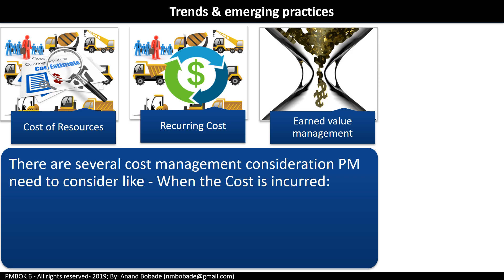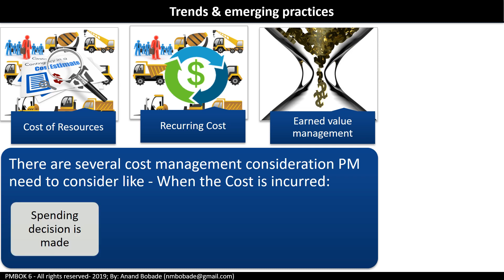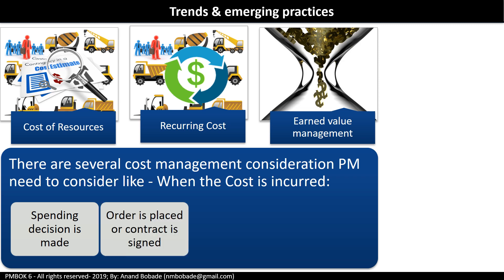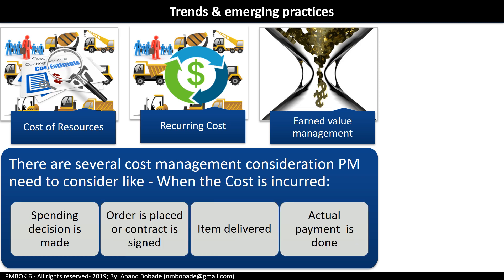There are several other cost management considerations a project manager needs to consider — like when the cost is actually incurred on the project. For example, when a decision to spend is made, such as when a steering committee approves $50,000 for advertisement, or when an order is placed, a contract is signed, an item is delivered, or actual payment is made. In my current organization, cost is incurred when an invoice is signed by the project manager and respective stakeholder and sent to finance for processing. Every organization has a different approach, so specific procedures need to be in place. The project manager also needs to think about return on investment and payback period analysis while preparing the budget.